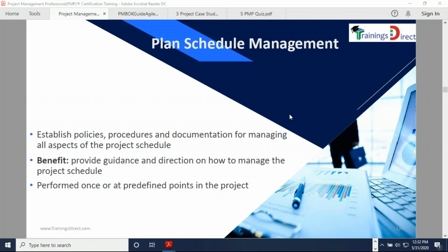But when we report to management or senior management in particular, we can't really report in too much detail. So therefore we need summary charts. So summary charts, for example, milestone chart is like a summary chart. That's why they're more popular with senior management.